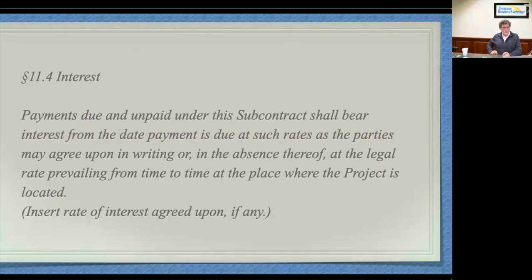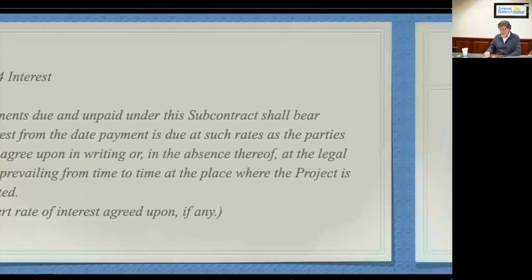I talked about statutes of limitation earlier, where I said to you that the parties to a contract can reduce that 6-year statute or, with a supplier, the 4-year statute. Interest can be reduced as well to zero. And I really encourage you to please locate and look at this clause before you sign your subcontract or your contract, okay? Because zero is a bad deal, whoever you are, unless you're the one writing the check. Then zero is a great deal. But you really ought to try to negotiate something in for interest. And it would be a negotiation. But zero is bad. You know, you get 0, 1, 2%, you're not getting any money on your money. And take a careful look at these interest clauses, please, okay?